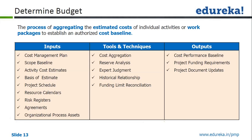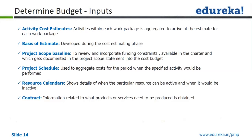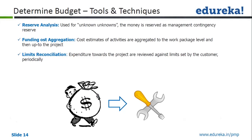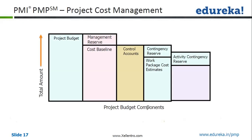The process of aggregating the estimated cost is very straightforward. We can use a simple tool like cost aggregation, which will just aggregate all the activity-related cost and work packages to establish and authorize a cost baseline. I'd like to show you one more graphical slide, which also talks about contingency reserve and management reserve.